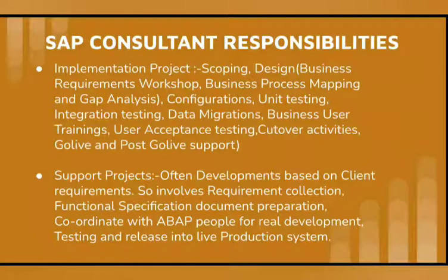in Mark 2. So the data is corrected in Mark 2, and in Mark 2 we need to collect at least 50% of data, and in Mark 3 we need to collect at least 90% of data. And Mark 4, that is the final data, 100%, that is the production data. So for this data collection and data templates, nothing should be changed from Mark 2 to Mark 4. If the data formats or data templates or anything change frequently, then the probability of mistakes will increase.